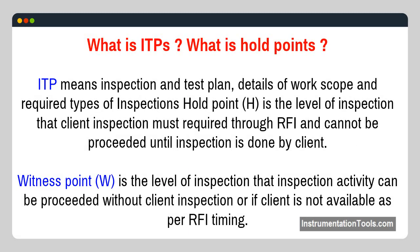What is an ITP and what are hold points? ITP means inspection and test plan — details of work scope and required types of inspections. Hold point (H) is the level of inspection that client inspection must be required through RFI and cannot be preceded until inspection is done by the client. Witness point (W) is the level of inspection where the activity can proceed without client inspection, or if the client is not available as per RFI timing.